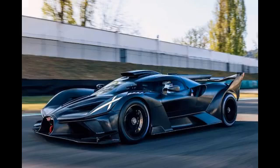Their engineering team has expertise in engine maintenance and performance tuning, with a documented history of achieving a 5% horsepower increase through routine tuning, resulting in an estimated 4,725 horsepower. However, LJRC acknowledges that achieving a targeted 20% increase for competing at the top level of drag racing requires specialized experience beyond their in-house capabilities. Considering cost implications, a more realistic baseline cost estimate for a 20% horsepower increase on a 4,500 horsepower engine is likely in the range of $50,000 to $100,000 or more.